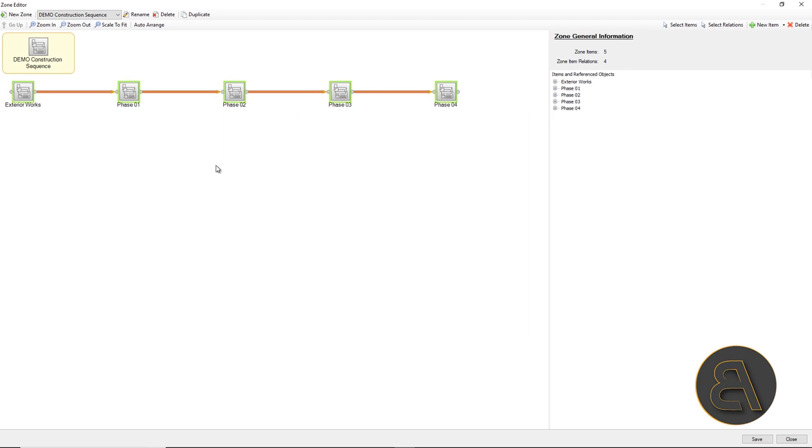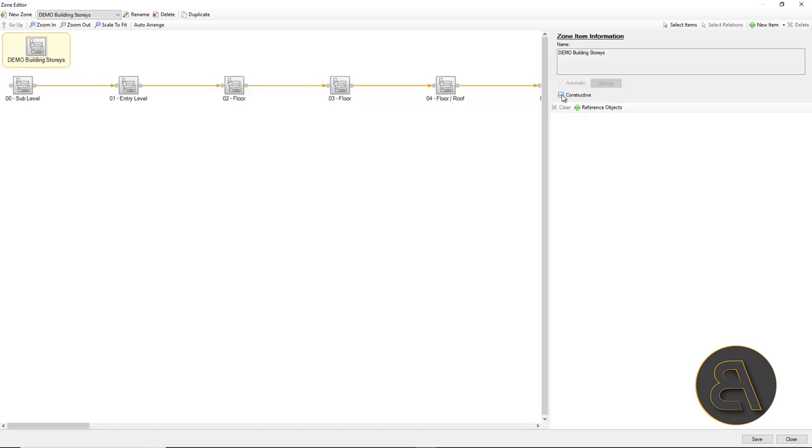If the elements have the appropriate properties, it is possible to automatically create selection sets based on these properties and use them for zones without any manual work.